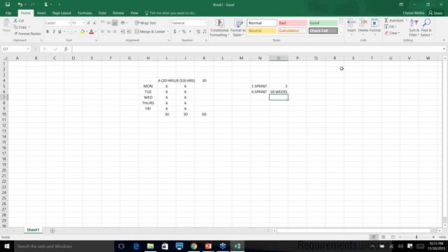And in Agile, of course, the cost is important, but you don't lock down any of these things. If it takes plus minus $20,000 to do this, you can talk to your customer and get an approval and do it. If they say no, then don't do it. It all depends on what your customer needs. If your customer tells you, I need this feature at any cost, you can say, in order to do this, we will have to do 2 more sprints, and that will cost us X amount of dollars. So would you like us to do it? If they say yes, then do it. Otherwise, don't do it.